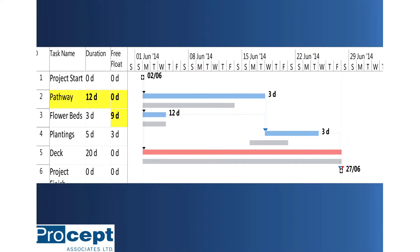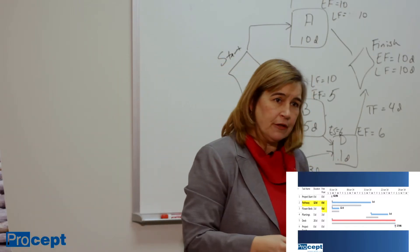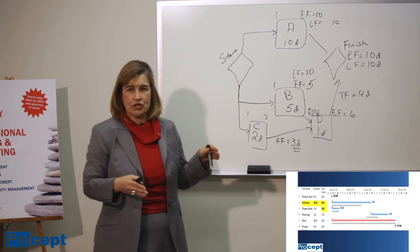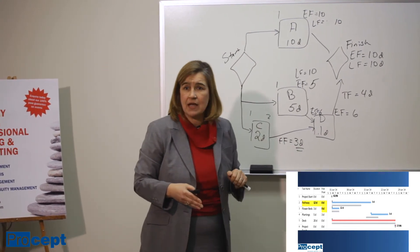If you delay pathway, which had zero free float, you can see the immediate follow-on effect on plantings. So if a task has zero free float, we have to ensure that resource coordination takes place and good communication if that predecessor task slips.